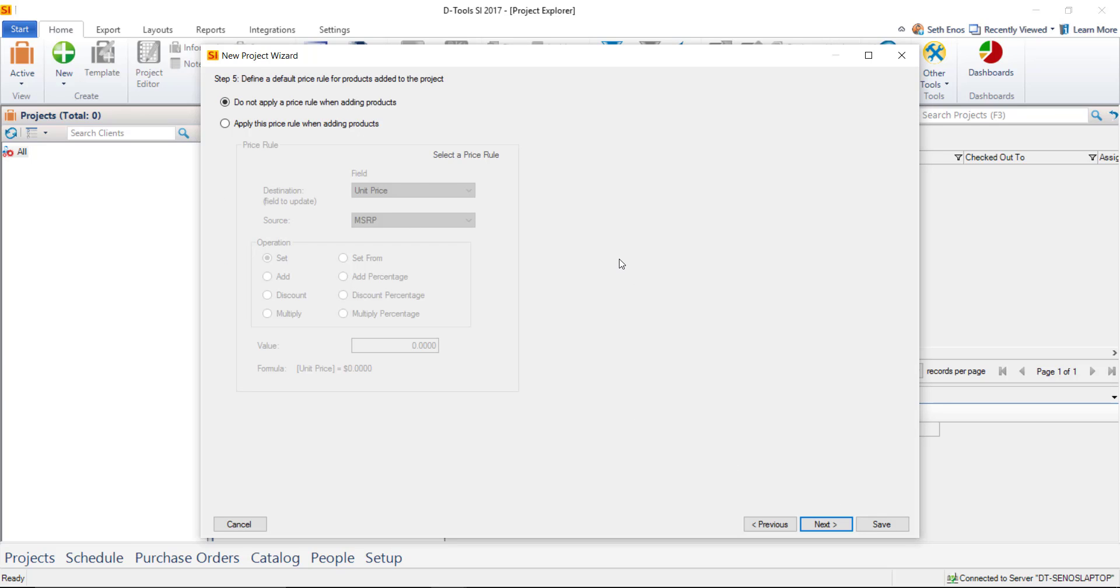Go ahead and click Next here. This is where you can apply a price rule to a project. Price rules will dictate the price of products as you add them to a project. For instance, if you were doing a cost plus project, cost plus a certain percentage rather than your retail price for your products, you could set that on a project level. But oftentimes you'll just skip this step.